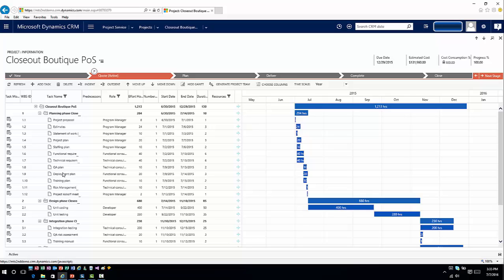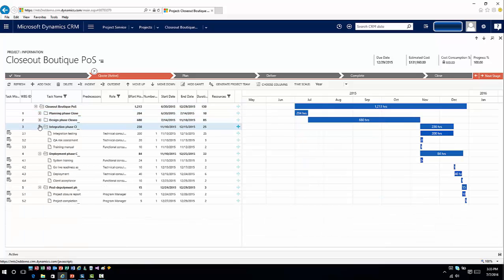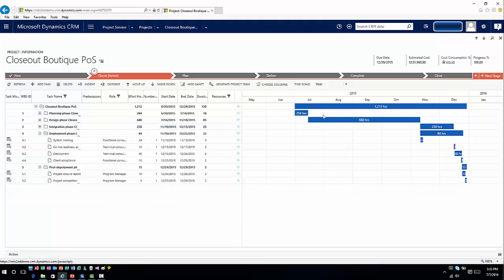What is the task? What is the information that's associated with it? What are the resources that are going to be assigned? And I can see the specific scenarios for the project itself. And just like if I was using this within Microsoft Project or something like that, I have my bar option that I can use within my Gantt chart to see specifically where I'm at, and then each one of these items has tasks underneath them, and I can associate what's happening within those tasks.